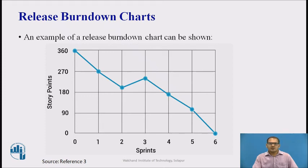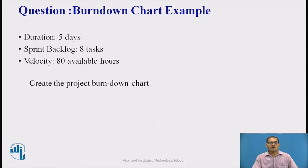This example also shows that in the first sprint, the team used 90 story points with 270 remaining. The second sprint ran smoothly as well. However, as you can see in the chart, something happened during the third sprint and the team burned up their story points. Once they resolved the issues in the third sprint, the project ran smoothly for the remaining sprints.